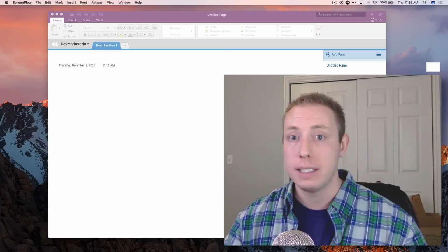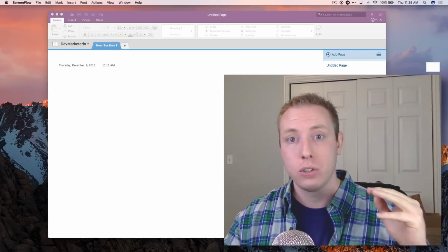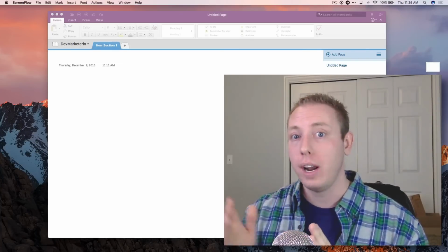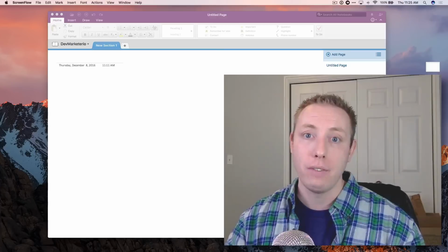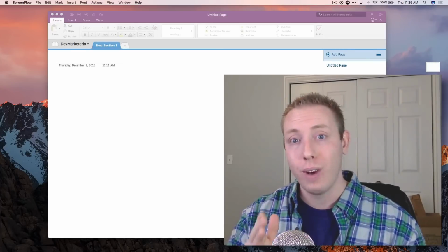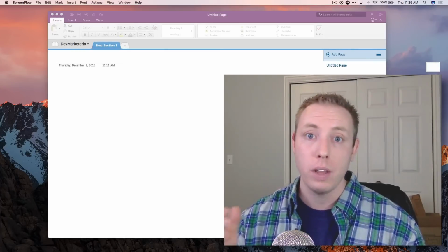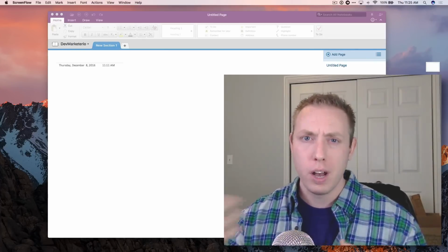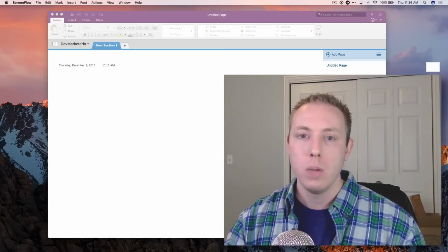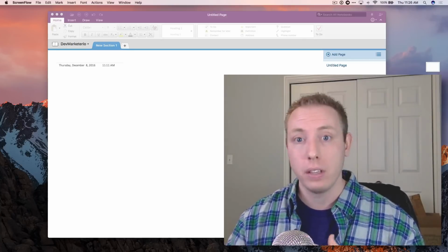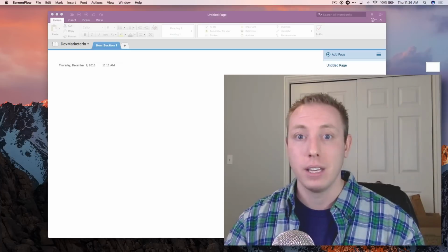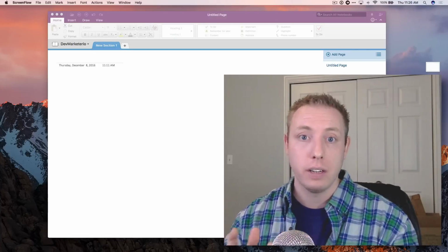You also release timelines for when you're going to finish certain milestones, and you usually create your milestones, and you have all that written down. You also write out when you're expecting to get paid, what the installments are. Usually on a large project, there'll be multiple installments. So you might have installments every 2 weeks. You might have monthly installments. It all depends on various different things. But you hash that out during the discovery phase.